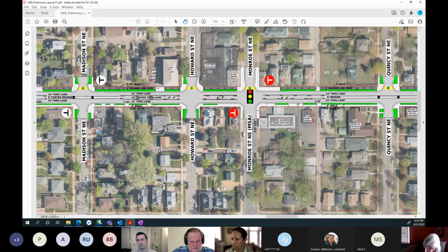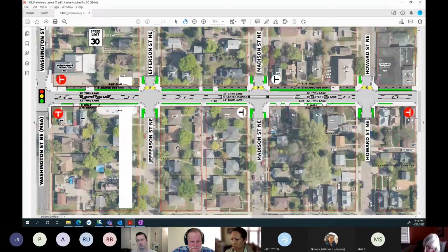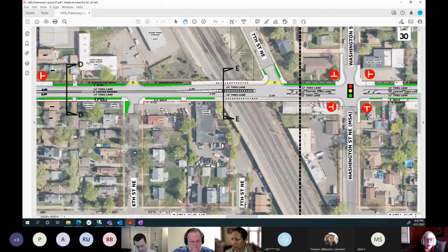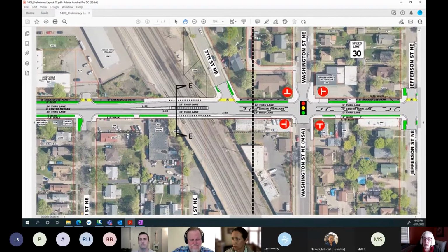And then I just wanted to go to continuing west on the layout. So Washington Street is approximately the dividing line for the phase 1 construction and phase 2 construction. So Washington Street to Johnson Street would be constructed first with our project, and that had been anticipated to begin in 2023. We're shifting that to 2024 for construction to begin of phase 1. Phase 2 construction is anticipated to begin in 2025.